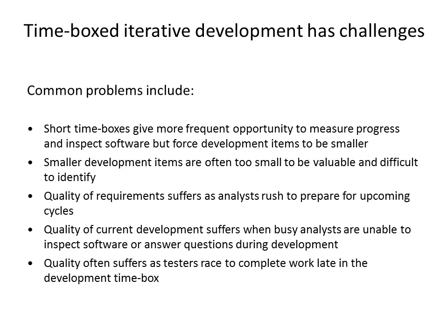For example, if certain bugs are reported and need to be fixed immediately, the user is not ready to wait for the end of the sprint. Neither can you add the bug in between the sprint, which violates the key Scrum rules. So having a process like Kanban is effective, while in some other cases where there's a very small development team, like 1 to 2 persons working on the product, we found Kanban to be more effective.